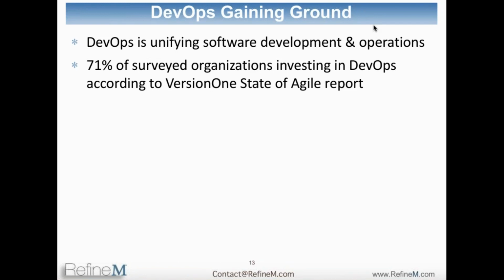And whatever the needs of the team in terms of those infrastructure needs, the DevOps normally is ahead by a couple of sprints. And they have to be. The reason is that if they are plowing the road for you, if you're laying out the road for the team, they have to be ahead. They cannot be behind. If they are ahead, then the team will be able to run and run well over that road. But if that road is not paved, the team will face bumps or holes over the road. So it will be very uneven, and you cannot run faster on an uneven road. You all know that.